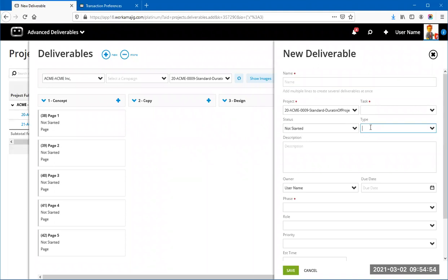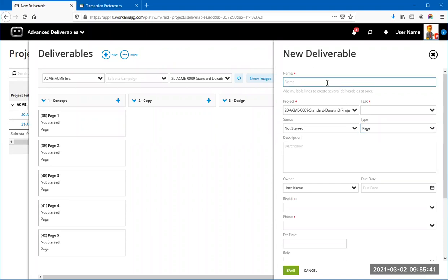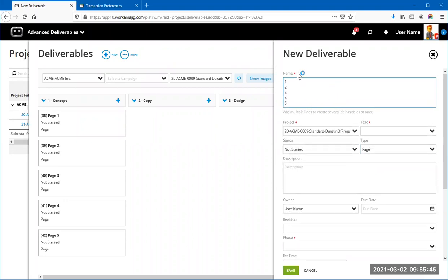If you manage it as one deliverable with a five-page PDF, it becomes challenging to know which pages are approved and which aren't when it's all one file. On this Concept task, we've added five deliverables using what we call Deliverable Types. When creating deliverables, you can type multiple names — hit Return after each — and it creates a new deliverable for each name. So you can create five deliverables for Page 1, Page 2, etc., at once.